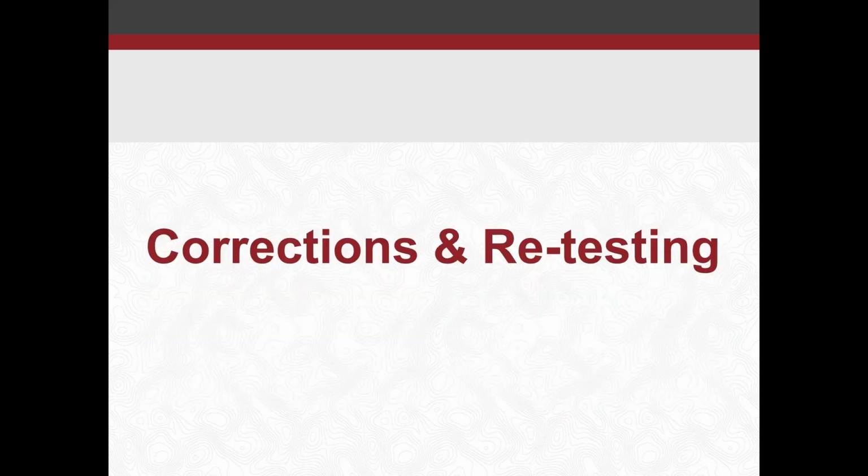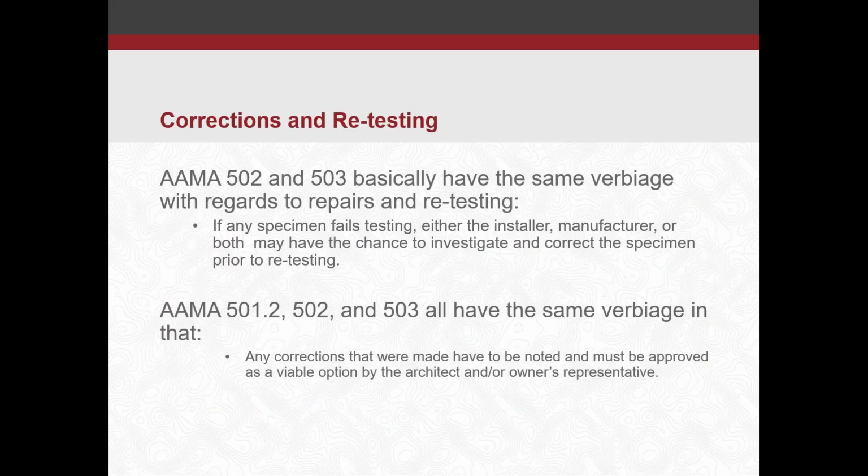Corrections and retesting. So AMA 502 and 503 basically have the same verbiage with regards to the repairs and retesting. If any specimen fails testing, either the installer, manufacturer, or both may have the chance to investigate and correct the specimen prior to retesting.